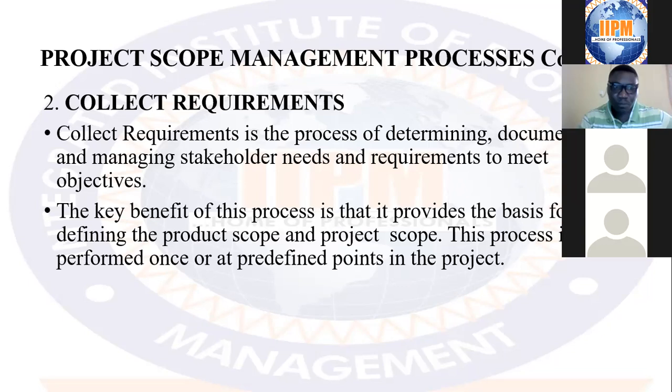Do I have any other question here? I think with some of the experiences that have been shared, the advice that has been given, we are better off. But for those of us in service, in fact whether you are in service or not, create your own form, your own letter of commissioning. If the person is coming to you, give the person that form. Even with contracts, there are some where people come to you, give them that form. Let them fill it before they give you your award letter, the mobilization letter. That's very, very important.